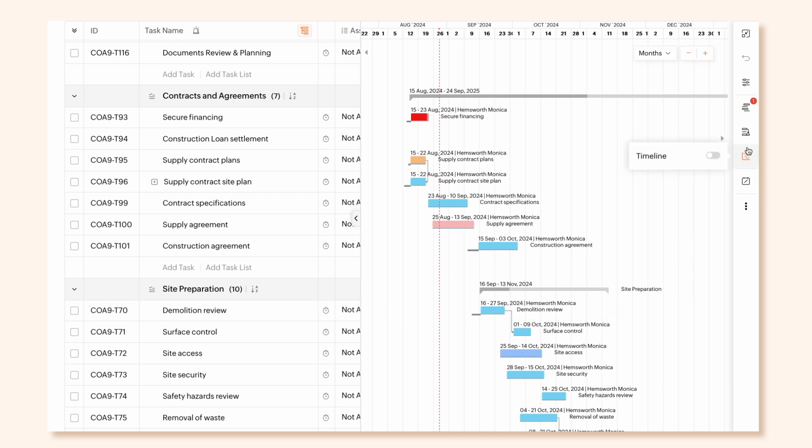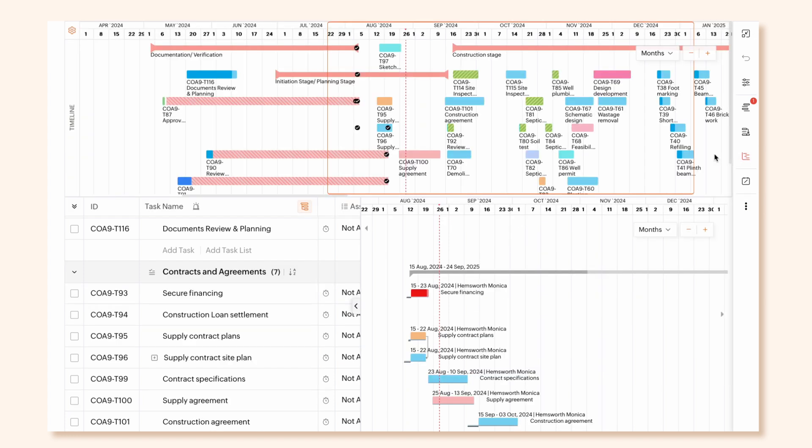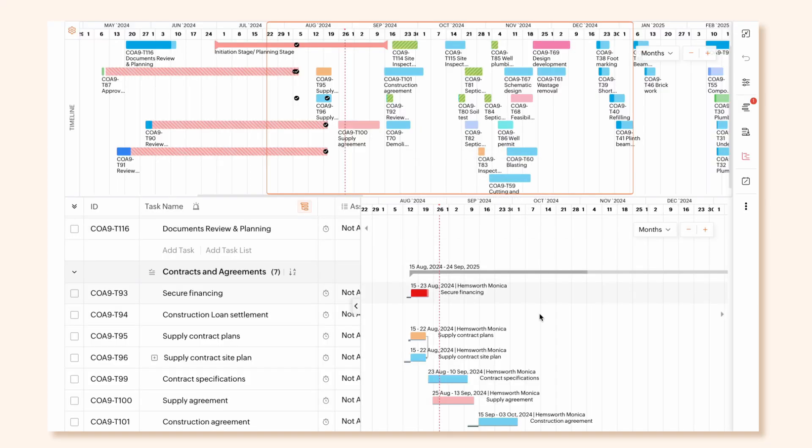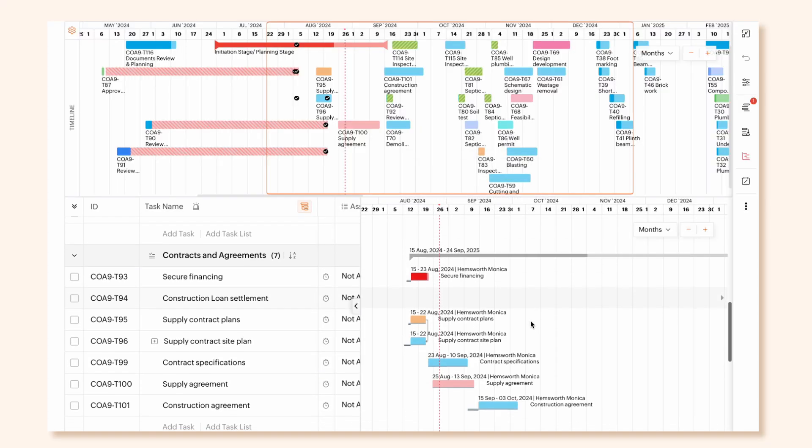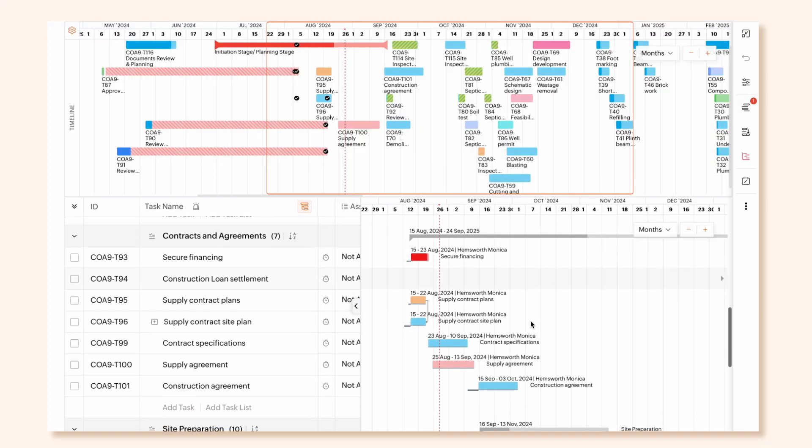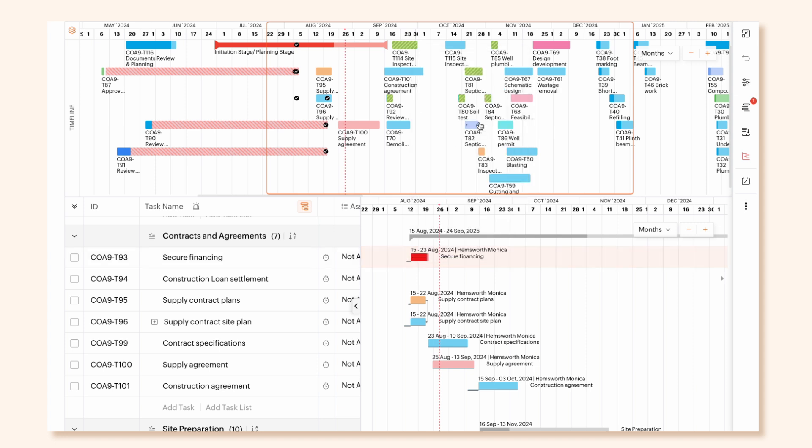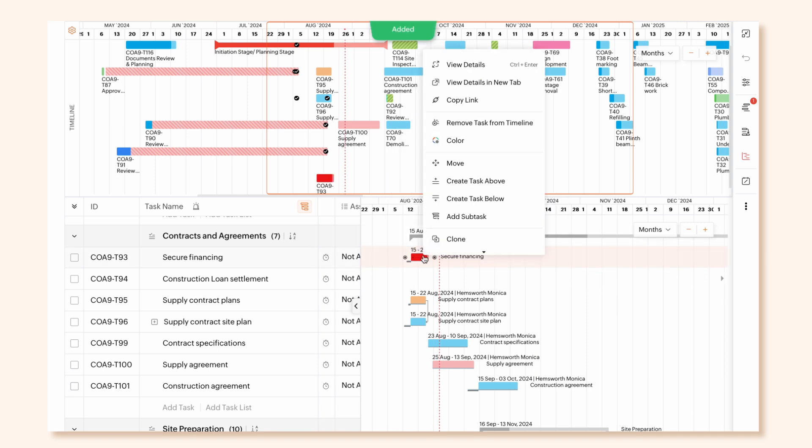Timeline gives you a picture of the duration of various project modules. You can add or remove tasks from the timeline as per your need. To add tasks to the timeline, right-click a taskbar on the Gantt chart and select Add Task to Timeline.